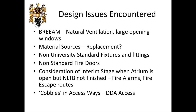Non-university standard fixtures and fittings are a nightmare for the maintenance people. We've got 16 different types of light fitting in the atrium, so think how many spares they've got to hold to keep the place lit — and apparently all on 16-week lead times. So if your light goes off, it's not the maintenance team's fault; they've got to wait for the light fitting. We're working through that with the design team to make it more standard so we can get a replacement locally.